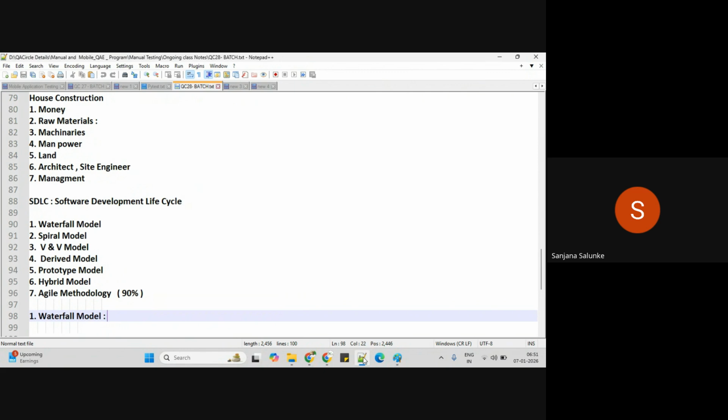After that, HR team, once the project is confirmed, HR team has to fulfill all the project open positions. It might be in the form of bench pool or from the market. HR team will help us to do resource availability study. Once feasibility study is completed, we are going to freeze the requirements, which means we will ask the customer to sign the agreement saying that no further requirements will be accepted. So requirements will be frozen after feasibility study, before the design stage.